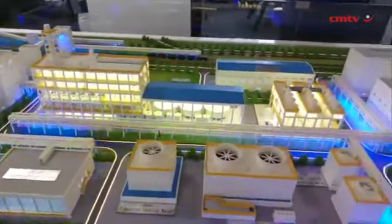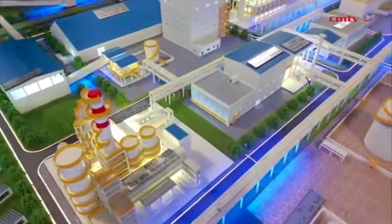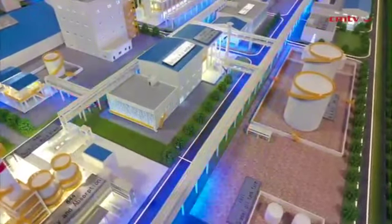Hopefully the actions that are happening around LNG will materialize in time for us to switch to LNG and even reduce our carbon footprint. So when you take those utilities, the rail and all of these things over and above the actual titanium dioxide plant, we have got almost $300 million in the ticket just to deal with utilities. So things that would have normally been operational expenses where we buy across the fence are things now that we had to bring in as capex, to avoid the risk of these things not being built on time. So we've put all of this under one package.